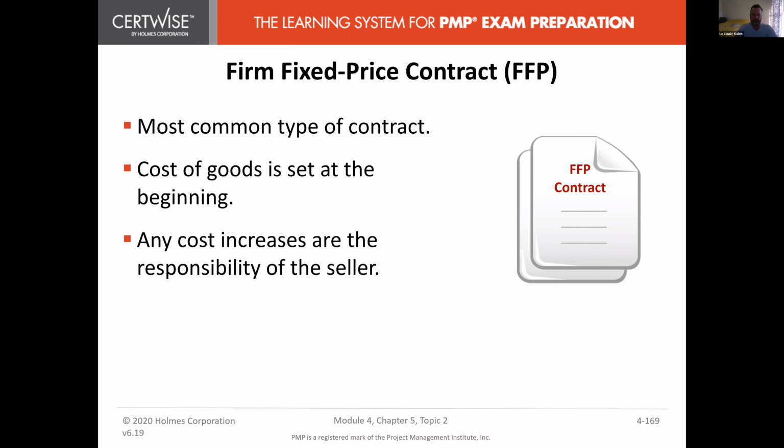Well, that would be on the seller or, say, a builder if you've already had a contract saying, this is the price that I'm willing to pay for you to build this home. Well, the builder then has to absorb the cost increase from the lumber because the contract's there. The only thing they can do is cancel the contract, but there might be a penalty for them canceling the contract. So that's kind of like a real world example that you guys might be able to see from the recent news here.